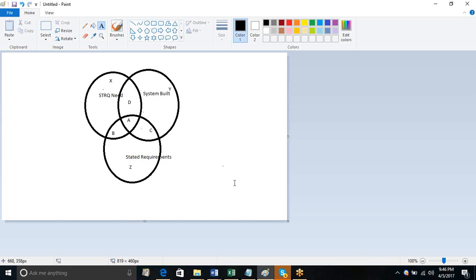So a stakeholder never asked for it, right? Yes. It was never asked for, but we stated it, gold plated. In PMI world, Project Management Institute terminology, gold plating is something where you give more than what has been asked for, right? So that means you're adding additional scope, scope creep. And I'm sure you guys have heard about this term called scope creep, and project managers would love to talk about it all the time.